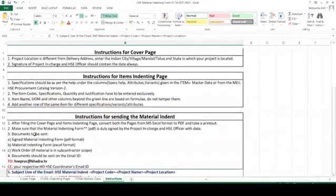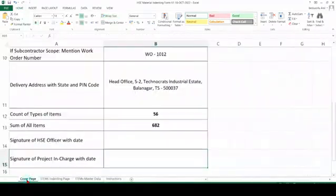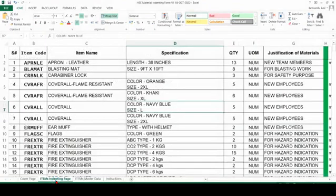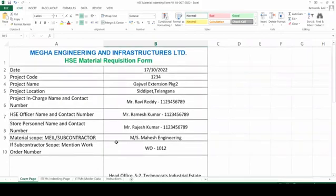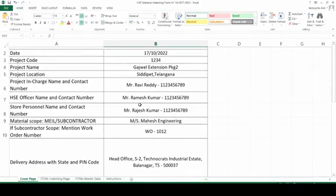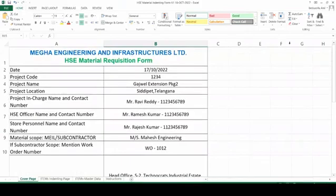So this is the whole format. Once you are done, please convert the cover page, take a signature of the project in charge with date, your signature with date, then the items indenting page. After all this is sent, we shall process the same indent within 15 days, and for tracking we will prepare an indent on eBills and share the tracking details with you immediately. This is the new format — thank you for listening, please follow the instructions.